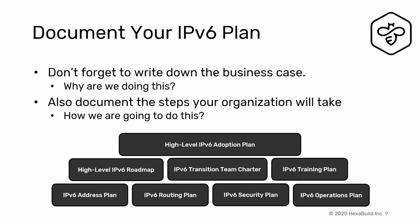So the network team, check, but no security team, no transition team, no training, no end user support, no desktop involvement, no applications were using it. So a fail. I give them a fail because they failed to get all the groups involved.